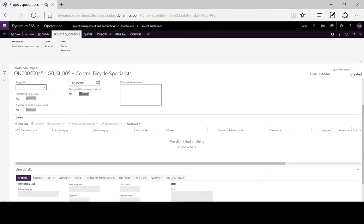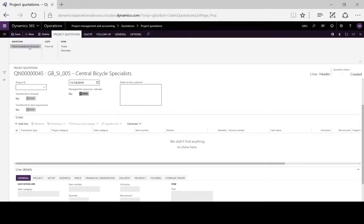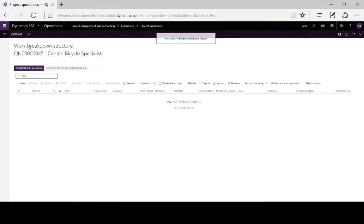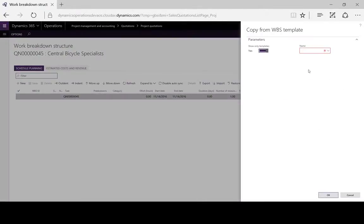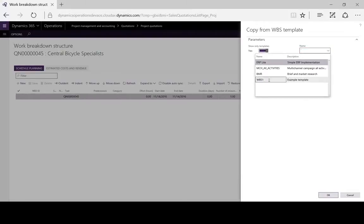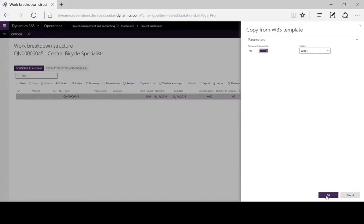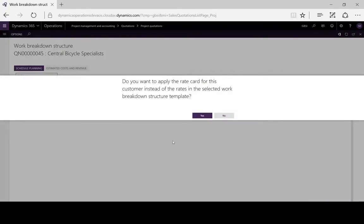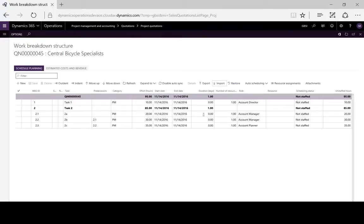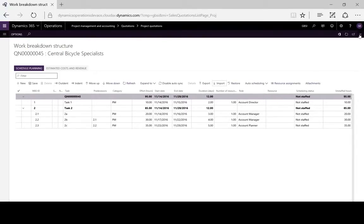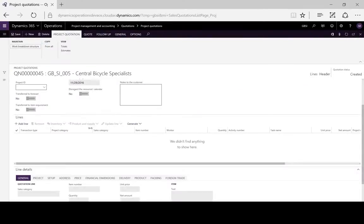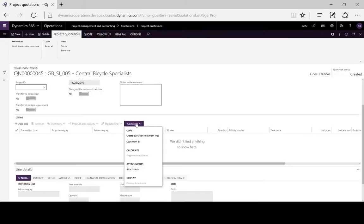Alternatively, we can import a work breakdown structure, which we will do. A very simple one we created earlier. We want to apply the rates for the customer, and here we have our hierarchy of tasks which we will use to generate lines for our project quotation.